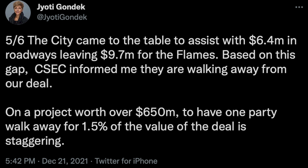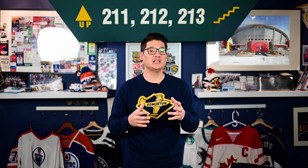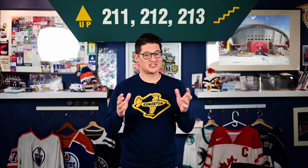Why this time? Apparently, it's over more cost overruns of climate mitigation and road sidewalk right-of-way issues, which of course, according to the new deal, would mean the Flames would have to cover those additional costs. The costs included $4 million in solar panel installations that was part of additions put forward by the city, which in the grand scheme of a $600 million arena deal just speaks to the delicate and at times hostile relationship between the city and the Flames.